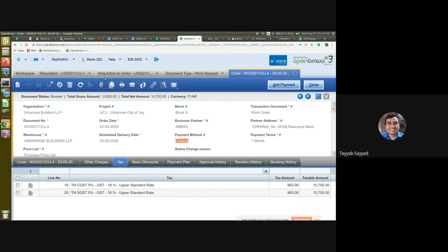No, I didn't get your point. What the account team is saying to us is what they communicated at the time of blueprint. They said, don't involve the TDS portion in the order. Just write TDS as applicable, and we'll take care of it at the time of billing. Whenever a contractor's bill or any bill is received, we will charge the TDS and will inform them that this is the TDS we deducted on this bill.